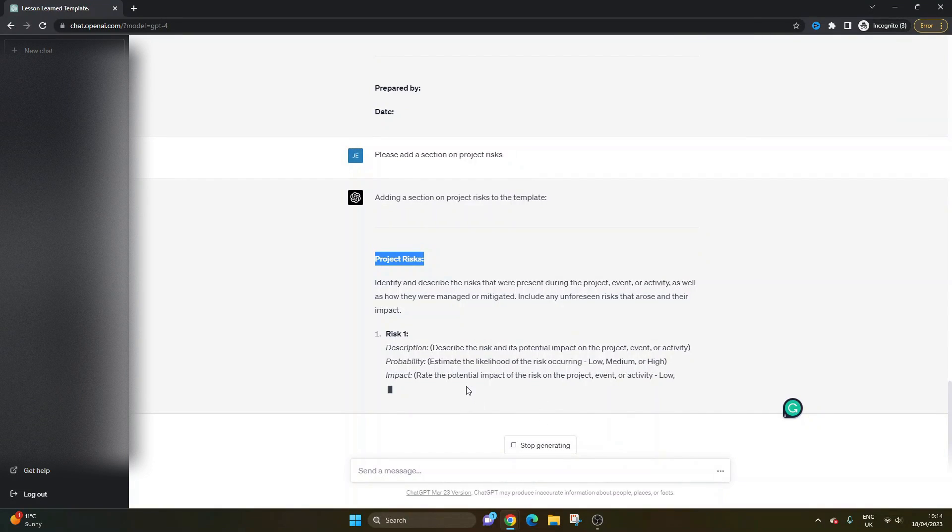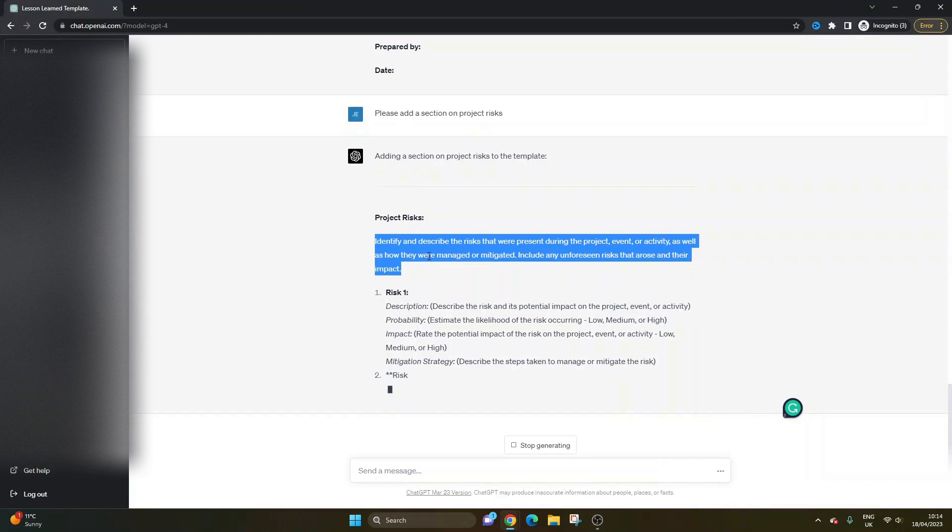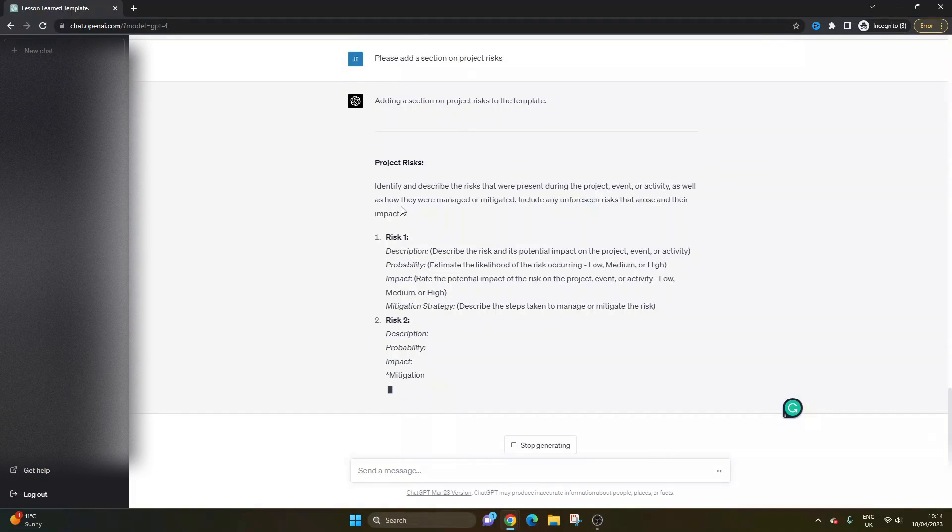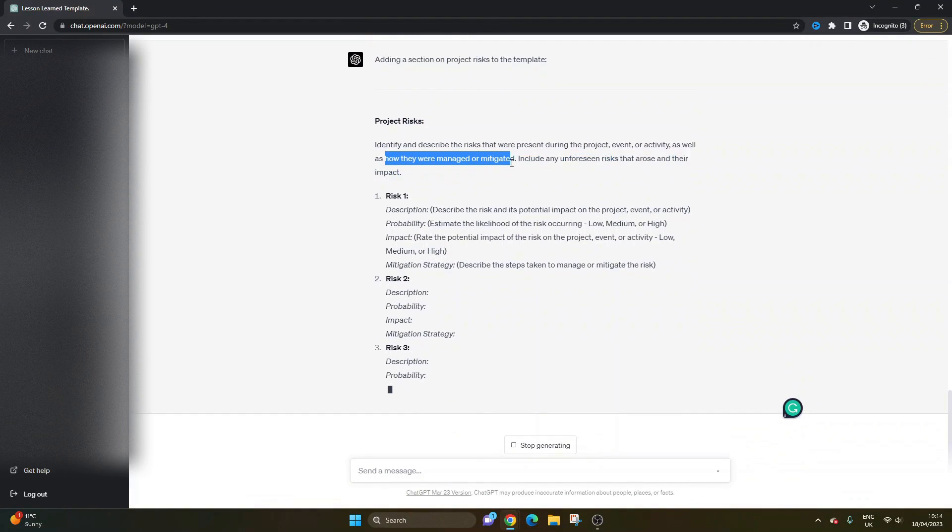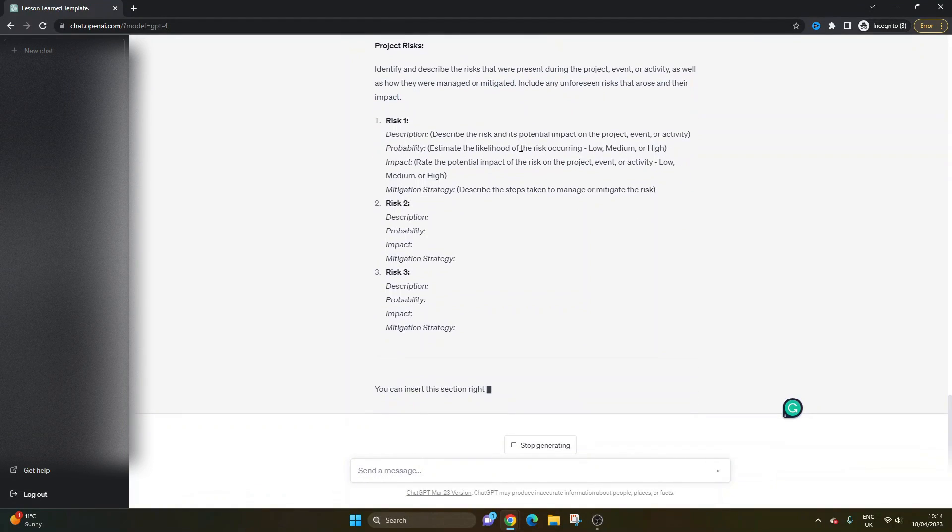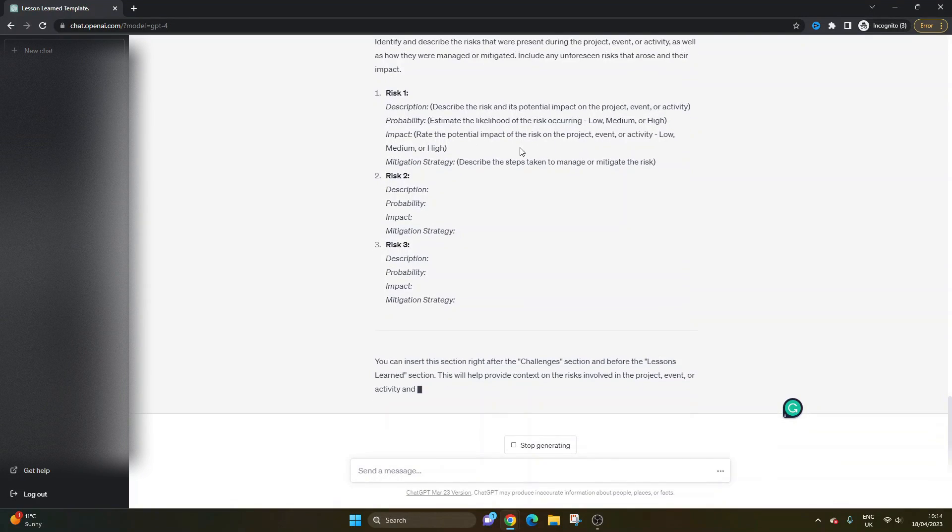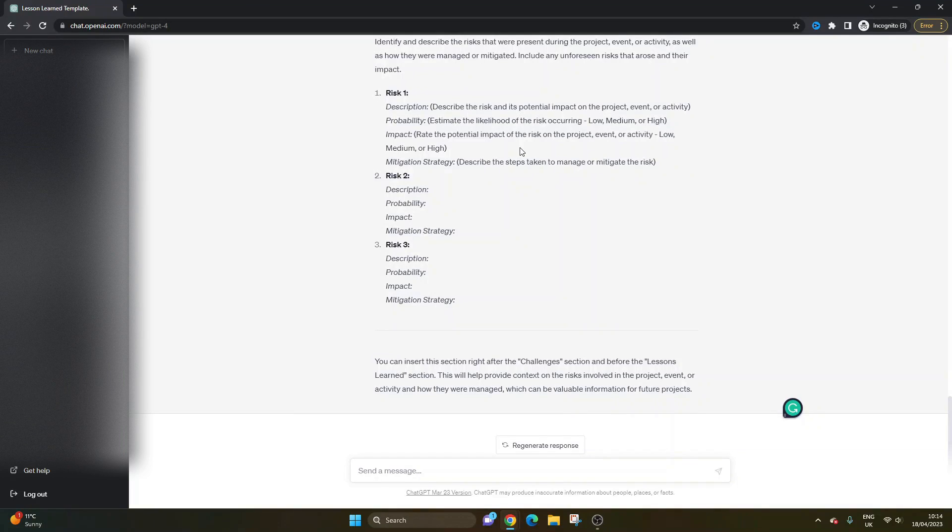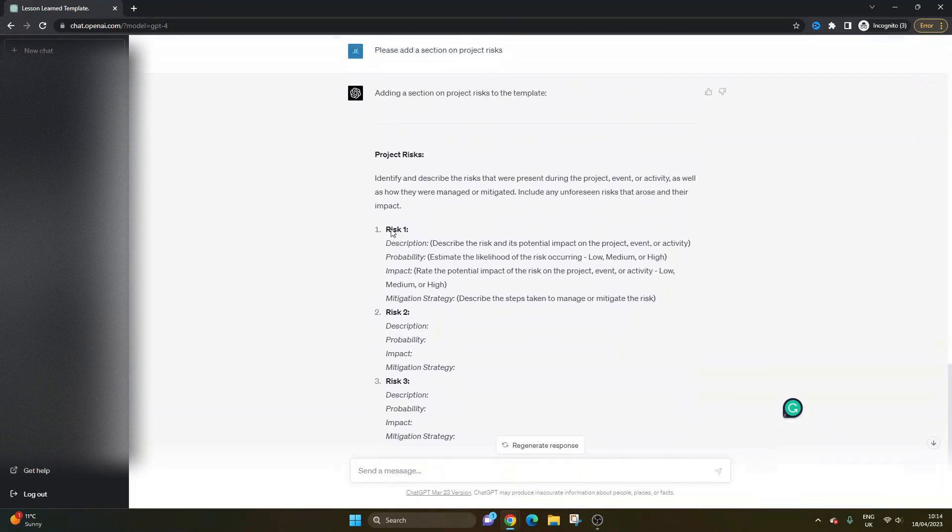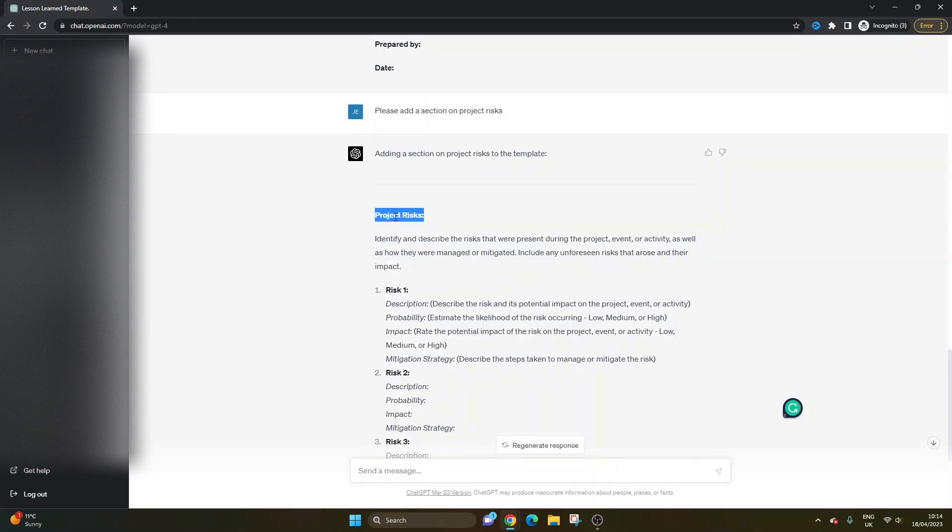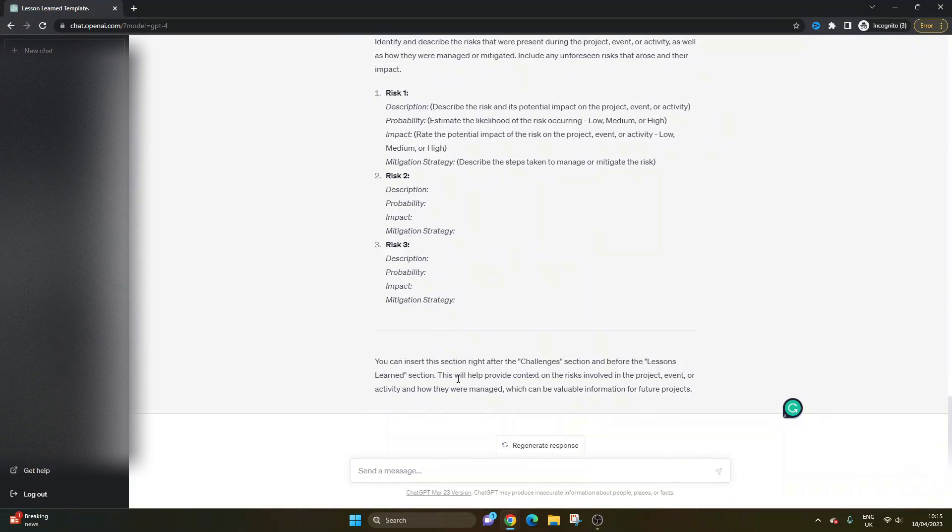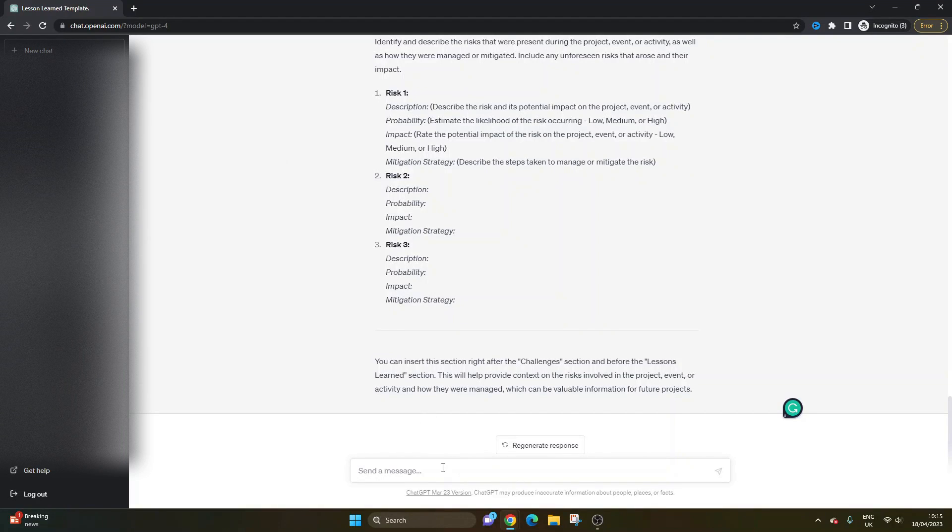What I like about this in terms of risks specifically is it's saying how they were managed or mitigated, include any unforeseen risks that arose and their impact. In terms of lessons learned, this can be really valuable because it can help us to be aware of potential risks that could arise on future projects. This is really good information to include, but of course I've drawn from my project management knowledge here and this wasn't included by default. Again, this is where Chat GPT is only as good as the prompts that you put in. You do need to think about it and think about project management methodology. You may even want to go on to Google and run some searches: what to include in a lessons learned template, get those sections, and then input it in.